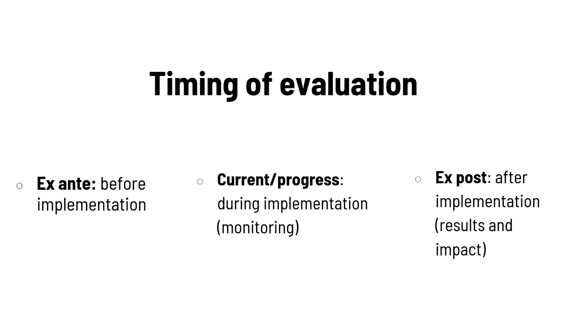Ex ante evaluation happens before implementation. This includes checking logic, consistency, and readiness. Current or progress evaluation happens during implementation. This includes monitoring resource use, activity execution, and partial results compared with plans. Ex post evaluation happens after implementation. This includes assessing results and impact against objectives.